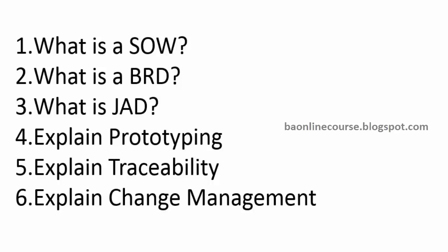So in that case, what do we do? You'll go back to the customer and say, no, this is not feasible, tell me a different way. To avoid all this, you have all these various stakeholders. You have the customer, you have the architects, you have the testers. Everybody would be there in the same room. You pick up the requirement, the customer tells it, the architect says what the alternatives possible for that are, and then the customer picks up the best one. All those happen as part of the JAD session.